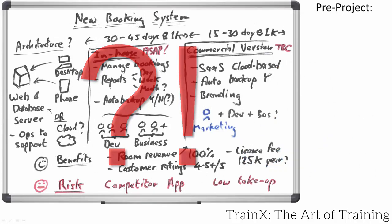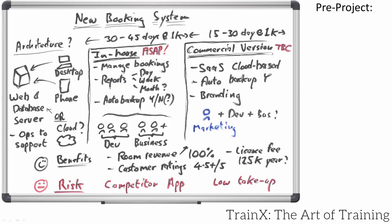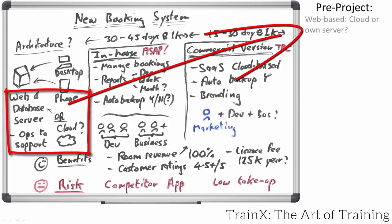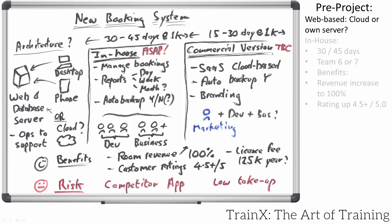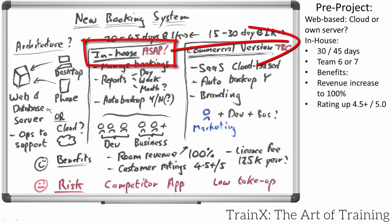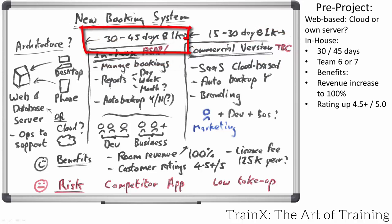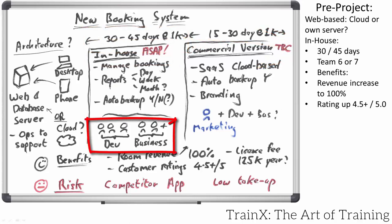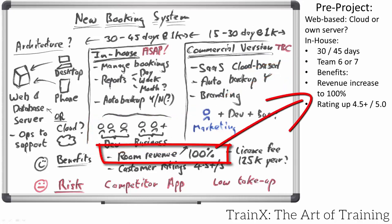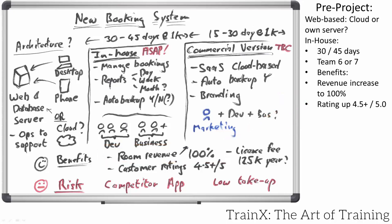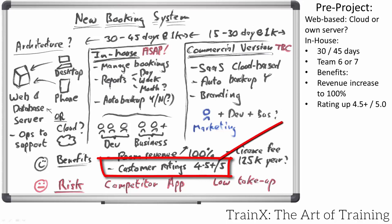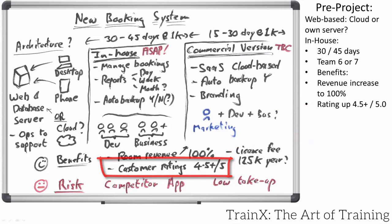Whiteboards are incredibly useful for capturing and organising discussion output. They wish to use desktop and phone-based browsers for their in-house team to manage bookings. They are not sure whether to use their own server or a cloud-based one — this will be investigated further. The CEO wants an in-house solution as soon as possible. Business and technology staff think it will take at least a month with the input of six or so people to develop the database, web pages and reports. The goal is to attain 100% of potential room hire revenue; currently they assess they are losing 50%.